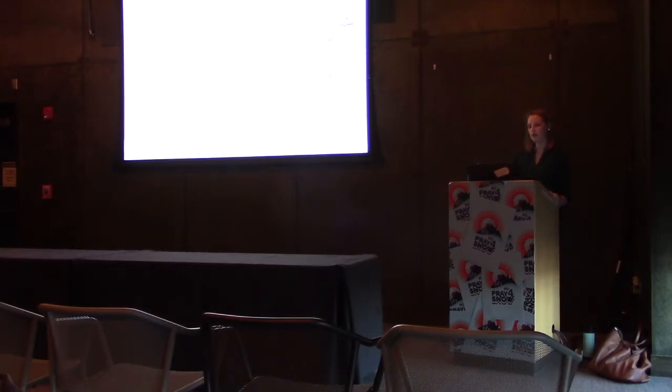In addition to the submittal applications, the submittal exhibits are also a very important part. And so making sure that those are detailed and easy to follow is also important. So showing plans and impacts over an aerial, as I mentioned before, is really helpful. It's just really hard to orient yourself with a project that you're really not familiar with if you don't have some sort of aerial background to look at. Showing and labeling all the aquatic resources, so again, that's wetlands, wet ditches, tributaries, lakes, stormwater ponds, anything that has water in it out there, make sure you're labeling it and identifying it.